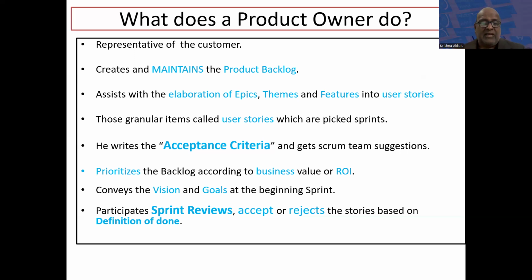Similarly, for the story, the developers developed the code, code review is done, and they built the unit test cases. They're following all the rules, like a function should not have more than 25 lines or something. The testing team wrote negative test cases and positive test cases. It also works in all environments. The documentation is ready. Like that, you check all the items and only then accept the story. All the bugs are fixed. If any item is not done, then he will reject the story. Otherwise, he accepts the story.